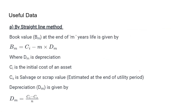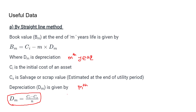Let's first calculate using the straight line method. The book value BV at the end of m years is given by: BV_m = CI − m × d_m, where d_m is the depreciation at the mth year, CI is the initial cost of the asset, CS is the salvage or scrap value, and depreciation at the mth year is given as d_m = (CI − CS) / n.